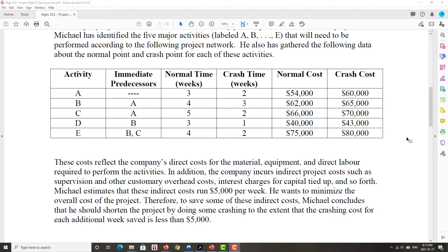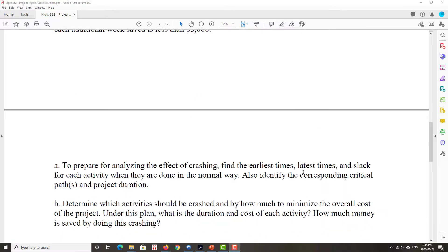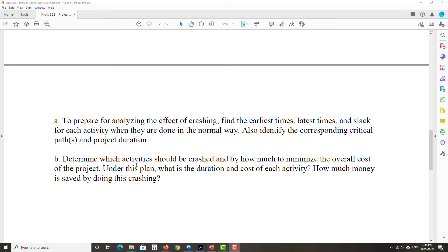So by reducing the project duration by one week, we save $5,000. Now there's a cost to crashing that particular project by that one week, and we'll now compare to see whether it's worth our while to reduce the duration of this project. So that's what we'll start off. We'll start off, we have to do all the preparatory work. And usually that preparatory work is, we'll draw out the diagram.